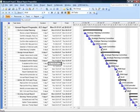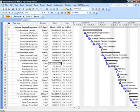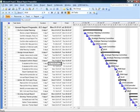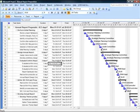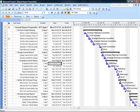Why do you need to save a baseline? Once my raw plan is ready and I'm all set to kick it off, at a later stage I should know what was planned and what is current. If I want to know the variance between planned and actual, it is very important to save a baseline. Saving a baseline is actually a key step in working with project schedule.